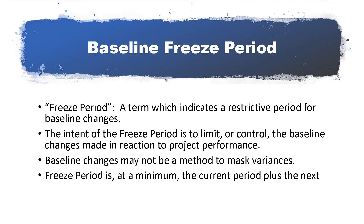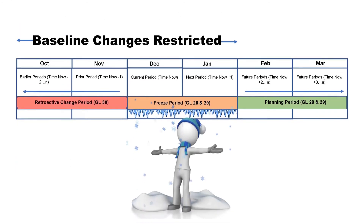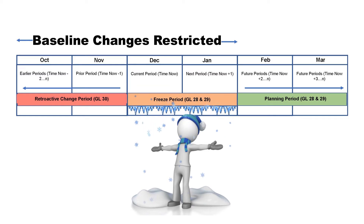Per DOE guidance, this freeze period is, at a minimum, the current accounting period plus the next accounting period. Frequent, continuing, or unallowable adjustments to the baseline within the freeze period are suggestive of a poor plan and will result in the lack of insight into the true performance and progress of the project. Repeated freeze period changes have the potential for actual cost misallocation and mischarging, as well as misstating actual performance against the plan. The freeze period is depicted in the graphic as the orange section spanning the months of December and January.